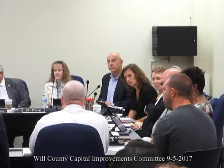And then we're going to need some lay-down area, which we know is limited. We're telling the bidders that, and we'll have to continue to work with Dave, Joel, to see what we can do on anything in that lot. But we're telling these guys, a lot of it's got to be just-in-time delivery.